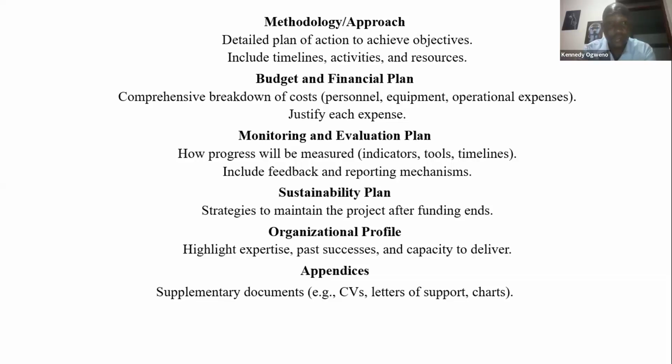Then monitoring, M&E plan. How will progress be measured? The indicators, the tools, and the timelines. The M&E plan, like the timeline, is one of it. If you look at your appendices in your proposal, it's an M&E plan, your timelines, that between this month to this month, I'll be doing data collection. Between this month to this month, I'll be doing data analysis. Between this month to this month, I'll be doing a presentation, okay? So these are some of the M&E plans that are supposed to be there.